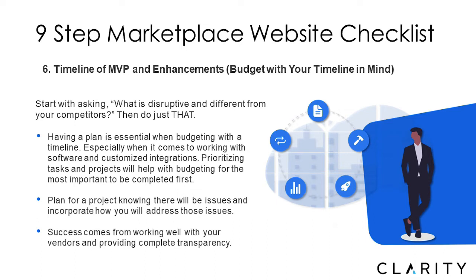We want to take advantage of everything that you know about your market, everything we know about marketplaces in general, etc. With that said, it is quite possible to build this out in phases. For example, you may have a specific niche within your marketplace that you can focus on, delivering a full solution with your new marketplace project for that niche as a first phase or an MVP. Focus on that exclusively, get everything working in that lower risk environment, and validate that it is in fact working and providing the value that's needed.